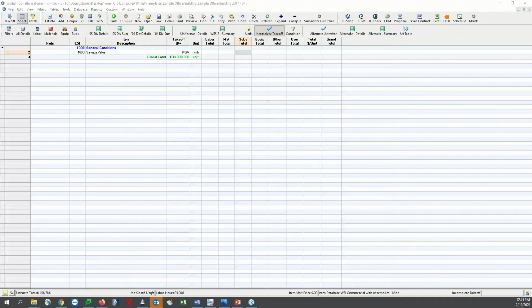I would have a material price link established on that item so that when it gets brought in from the database, I just update it in one table, and it will update all 100 items at one time if they're all the same item. If they're different and they rely on different pricing, then you would create a material price link for all the things that are similar with each other, where I'm running into multiple instances of things. So that's how I would do that.